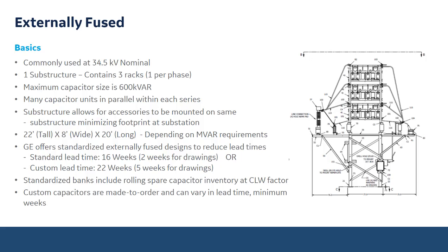By using this, if there's no spares out on site, in order to get that bank up and energized again, you can place an order with Clearwater, and we can supply those spare units much quicker than a custom unit that will have a much longer lead time.